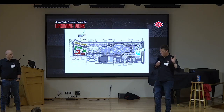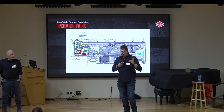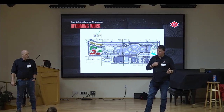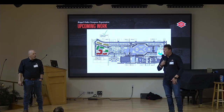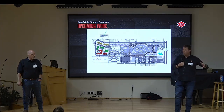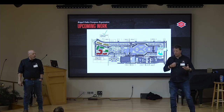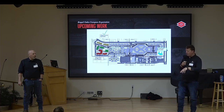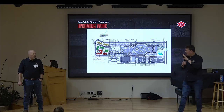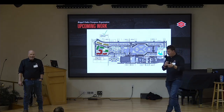And then we're going through and getting our health department inspections. We've already had our 70%, and some comments came out of that. We're addressing those. The kitchen equipment is like 98% set and installed. So we're caulking things and sealing things up and getting all those finishing touches, making the last plumbing connections right now. We should be finishing with those by the middle of next week. So we're really ready for some of those things to come to fruition. So when we say we're in March, just to double back on Sean's comment, that's us getting done for the health department and things of that sort.